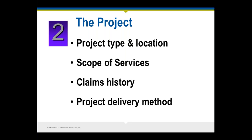Another important thing is whether the construction documents will be completed prior to construction, or completed in stages while construction proceeds — otherwise known as fast-track. Fast-track projects tend to be riskier and often result in more claims than the more traditionally delivered method.